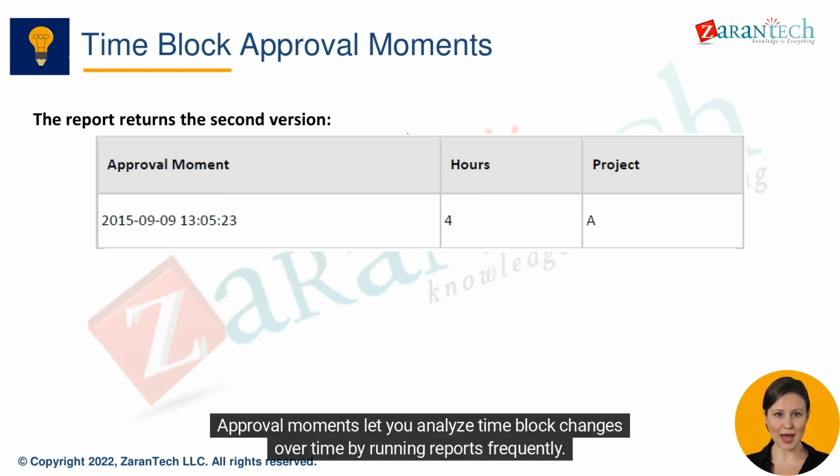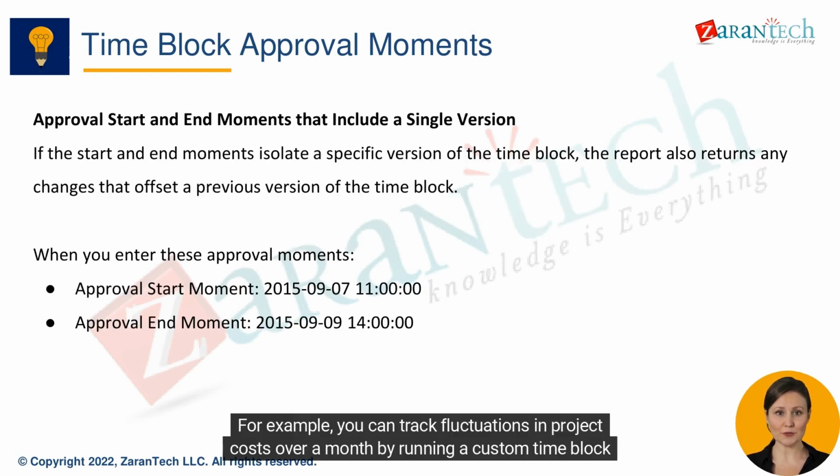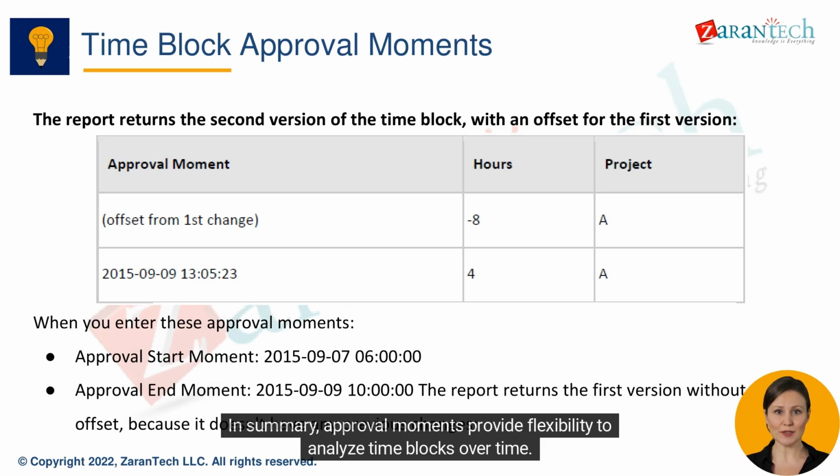Approval moments let you analyze time block changes over time by running reports frequently. For example, you can track fluctuations in project costs over a month by running a custom time block report weekly. In summary, approval moments provide flexibility to analyze time blocks over time.